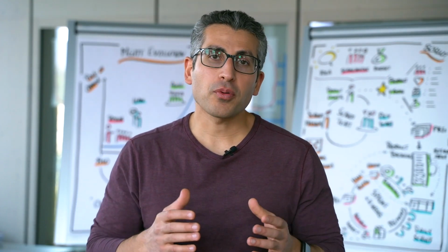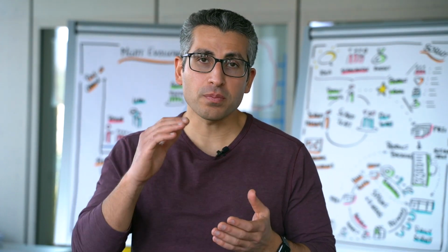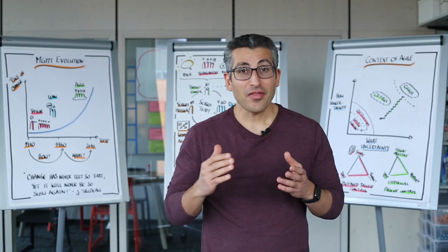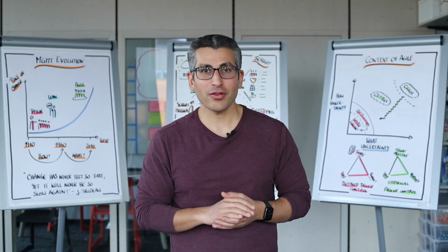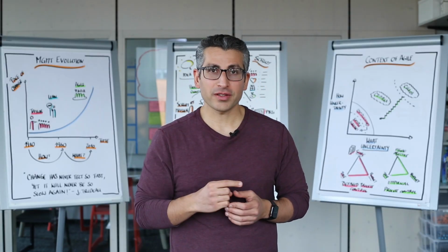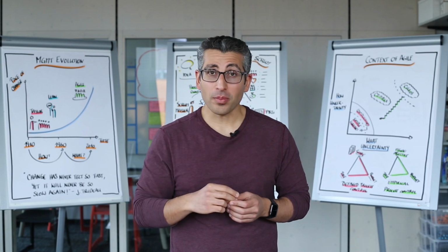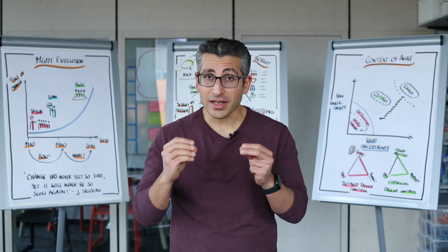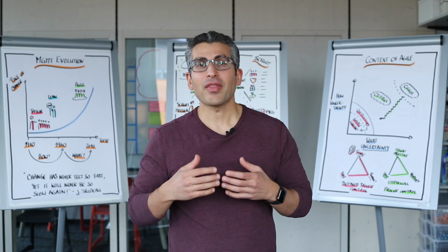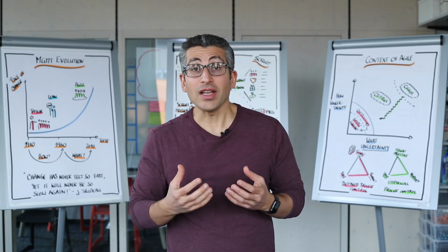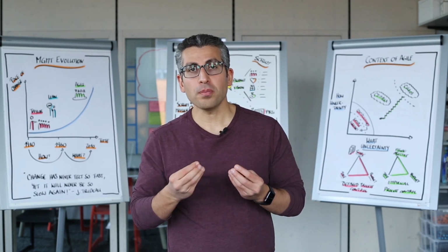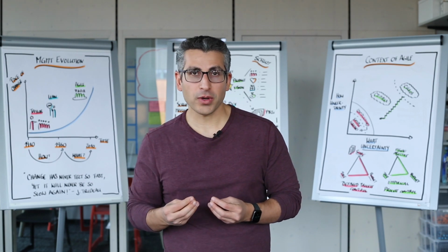The objective of a product backlog refinement is to put our product backlog into a place that it's ready for the next sprint planning. That means getting back to the characteristics: that it's prioritized, that the items at the top are well defined and clear with regards to detail, and that the team in general has enough items for them to pull into their next sprint.